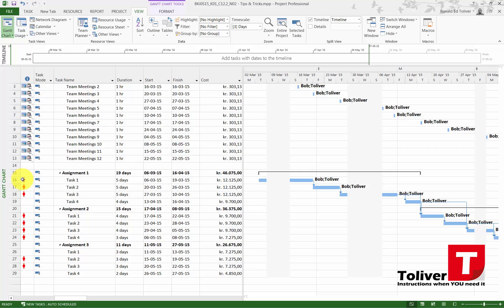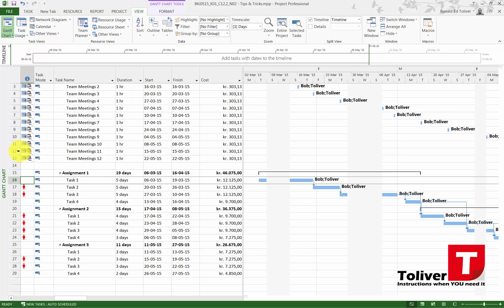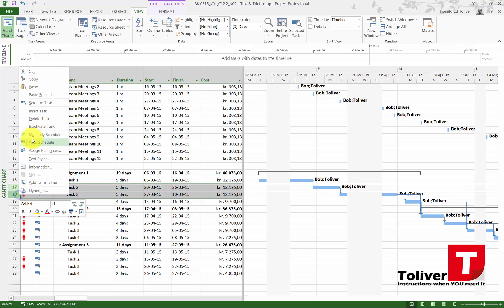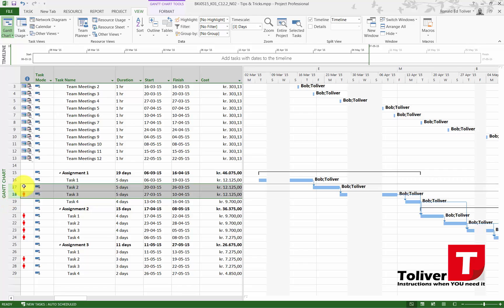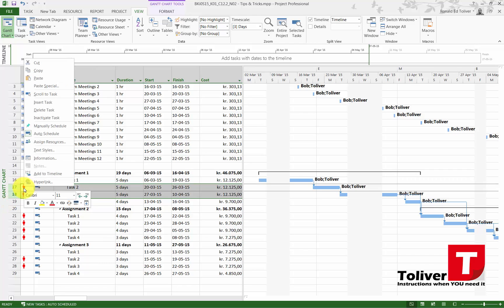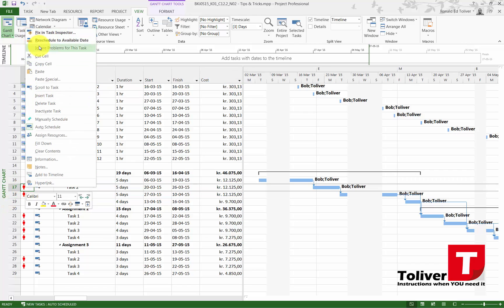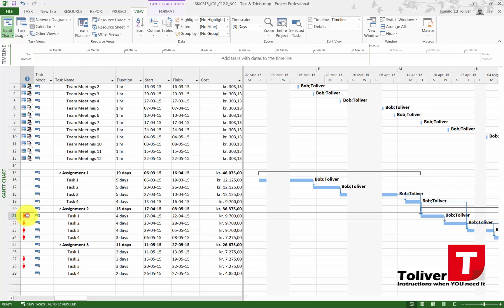The last option I have is I'm actually just going to go ahead and say ignore problem for this task. What is going to happen is that this task is going to get overtime. Ignore, no more problems.